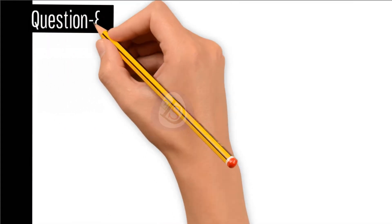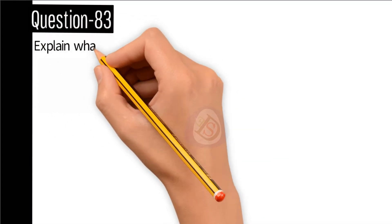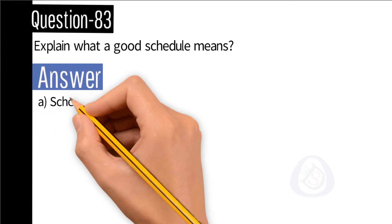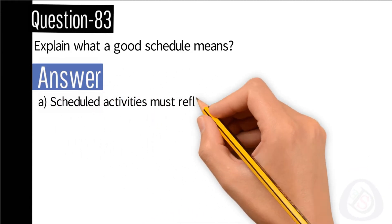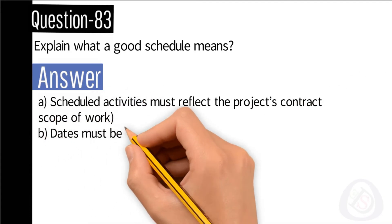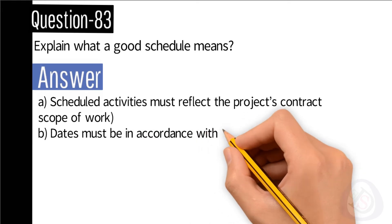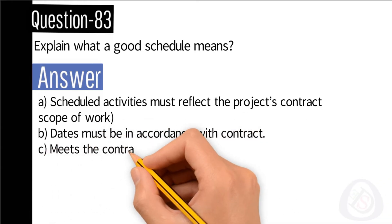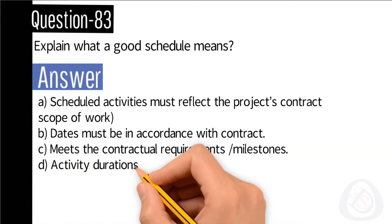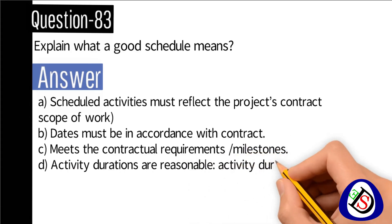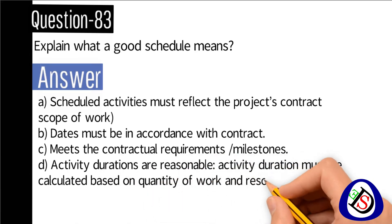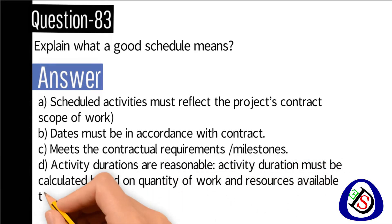Question number 83: Explain what a good schedule means. Answer: A) Scheduled activities must reflect the project's contract scope of work. B) Dates must be in accordance with the contract. C) It meets the contractual requirements or milestones. D) Activity durations are reasonable — activity duration must be calculated based on quantity of work and resources available to be applied to the work.